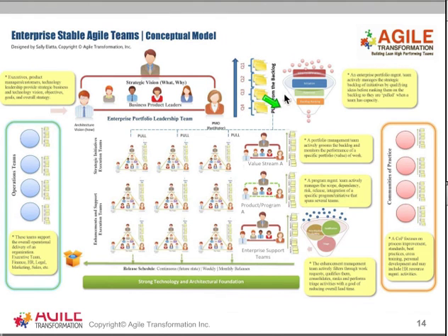When you are thinking about the enterprise backlog of initiatives that you want, we're going to have you learn through lean portfolio management how to break those things down into quarterly chunks and how to revisit your priorities every quarter, right? Whether you're using scaled agile as a method or DAD, the disciplined agile delivery, or any of the other Scrum of Scrums, the quarterly planning and quarterly breakdown of these initiatives is extremely important.